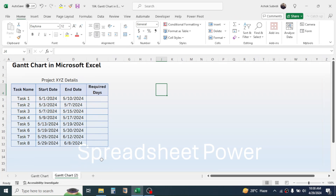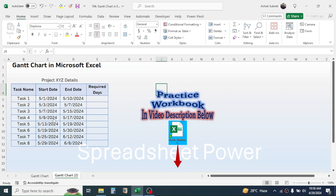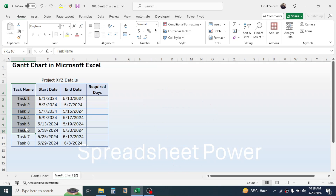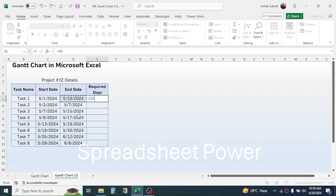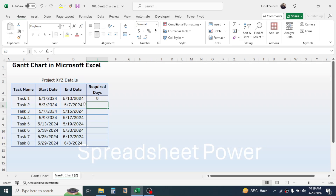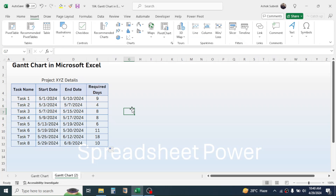Let's go to this new sheet and start creating the Gantt chart. Here I have the project information in a table which contains the task name, starting date, and ending date. To calculate the required days, you can simply subtract the start date from the end date. Press equal to, click on the ending date, minus the starting date of the task. This gives you the required days. Simply drag this down to calculate the days for the other tasks.